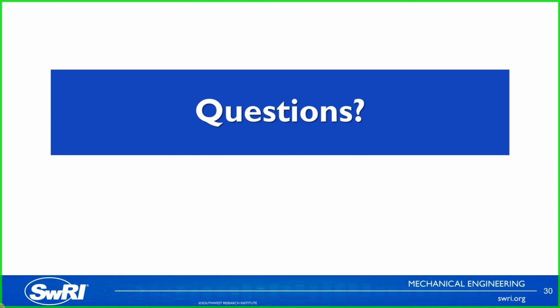My best response without taking a lot of time to think about it is kind of what they say with software: take what time you think it's going to take and multiply it by 4. I think that's a good starting location for how long commissioning will take. But again, it depends on the complexity of the system itself. As a starting point, that may get you somewhere pretty close.